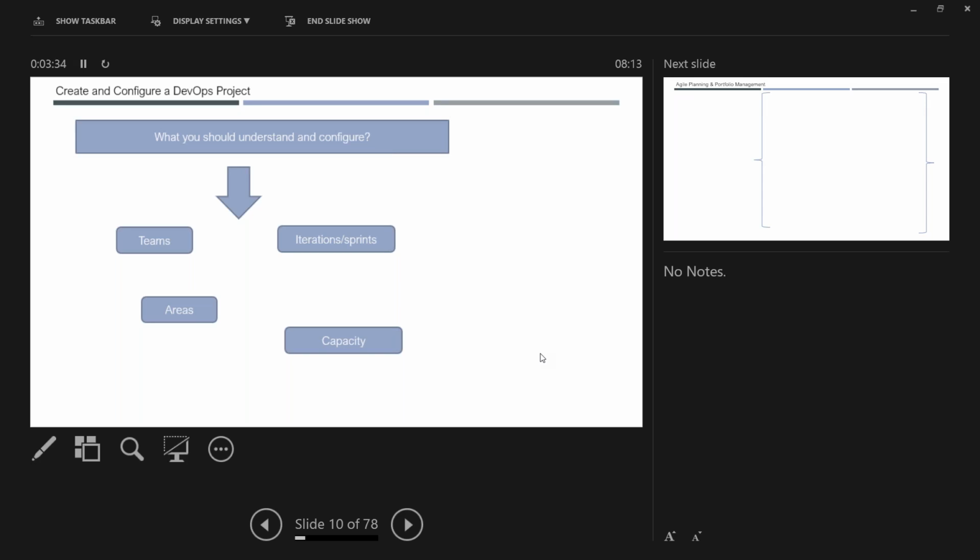Okay, you create teams, and then you create the sprints, because I'm just recapping it because people might forget. Okay, so you have some 100 requirements spreading across 3 months. If you are using a Scrum methodology, you will work in a sprint mode. Okay, each sprint may be 2 weeks duration. So then you have to specify how many developers are there and who is working on what in that sprint.